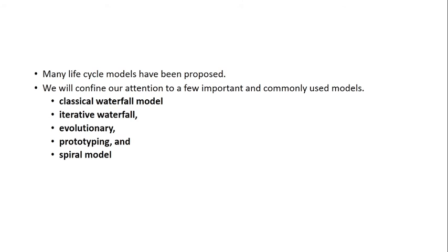And once the customer is satisfied, he feels okay, fine, this is how I want this page. So I got the requirement from his feedback, what he actually wants. Now from those requirements, I will be developing another 9 pages on the same grounds. Rather than developing all the 10 and giving it to the customer and he rejects it, I just developed on a smaller scale, that is a single page, got it evaluated by the customer, got his feedback and implemented or modified all those changes. And once he is satisfied, then only I proceeded with another 9 pages.